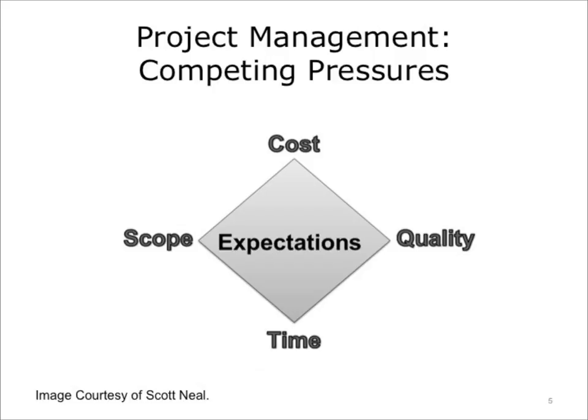The concept is quite simple. When a user requests an additional report, not originally agreed on in the project specifications, the project's scope and quality change, resulting in an imbalance and skewing the shape of the diamond unless changes in the remaining components are made to bring the project back on track. We refer to this relationship as the project diamond.